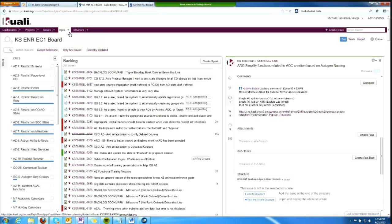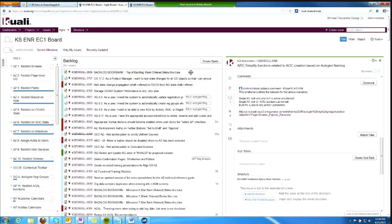The backlog contains a series of bookmarks that help the product owners and I place tickets within groupings of prioritization based on milestones and sometimes based on priority categories. This helps team members situate tickets within groups of work.